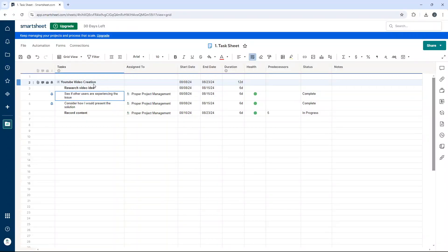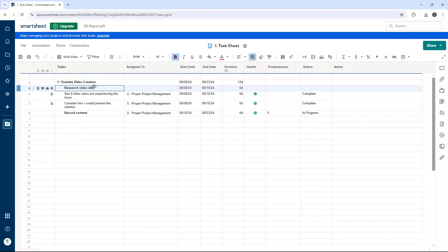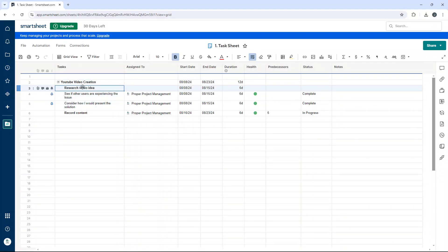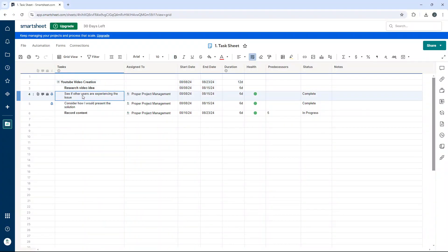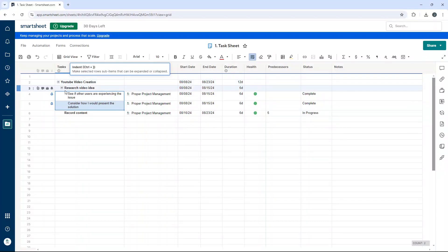Now I also want to mention that you can also create a hierarchy from this parent row. So as an example, this is a task and we have sub tasks underneath that parental task. So what you can do is go through the same process. So we're going to select these two and press indent.